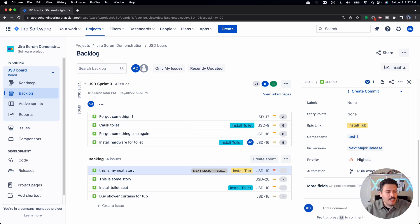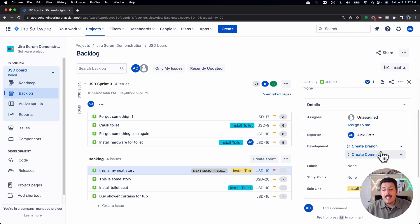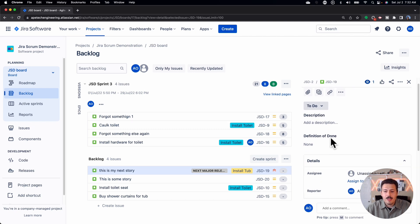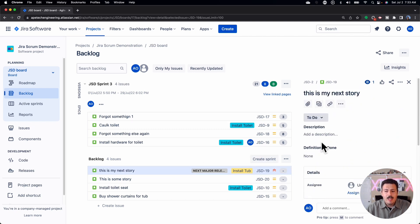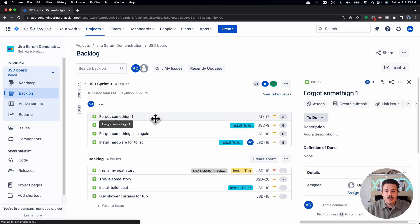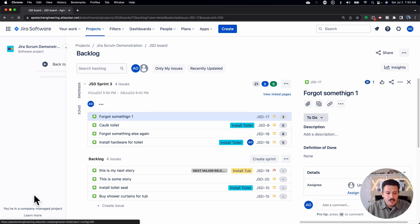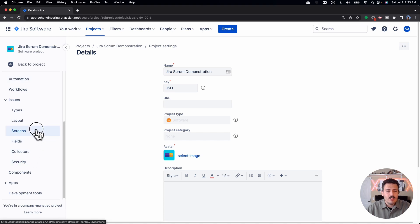The next tip: as a product owner, you're setting and defining the acceptance criteria. If you don't have acceptance criteria in your issue, we have a problem. You want to make sure acceptance criteria is indeed in your stories. This should be a field — as you can see, it's not shown here — so all you need to do is talk to your Jira administrator and get an acceptance criteria field created.